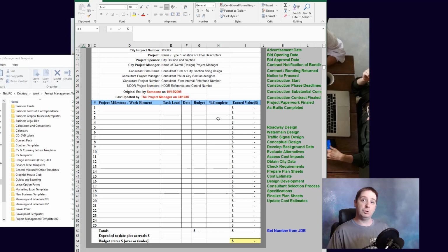Most people don't include task meetings in their budget, which I believe is a detriment to how you get paid. Let's say you're a consulting firm. You should include every single element of your resource in there. If it's a status meeting, if it's a daily stand-up, if it requires travel, you need to put that in here so that the resources are allocated properly and so that you can understand what it's going to take to truly complete this project.